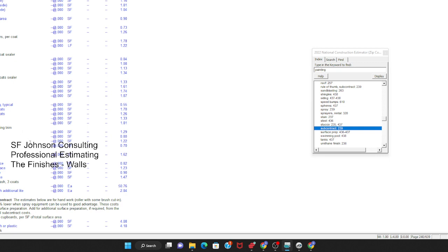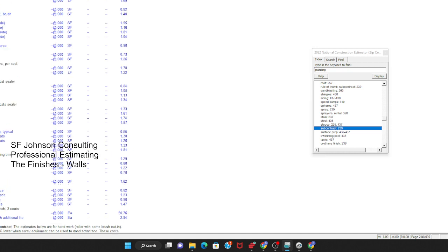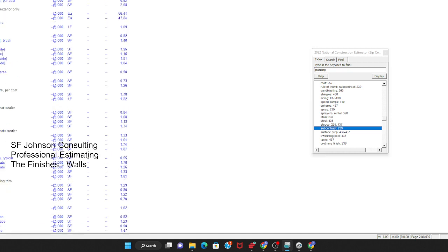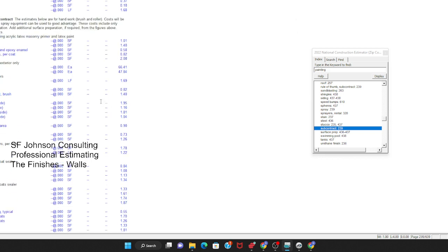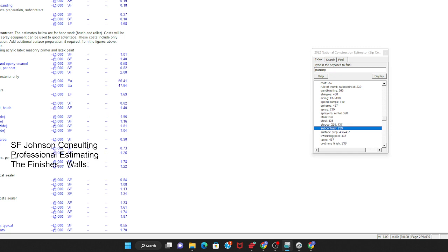So siding, roofs, porches, metal, lattice work. Of course, that's going to be more, not too far off because, you know, that's an intricate whatever. And that's the cost per square foot. Handrails, linear foot, $1.22. So this is paint and labor, subcontract per linear foot, per square foot.